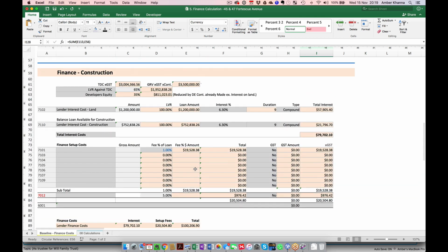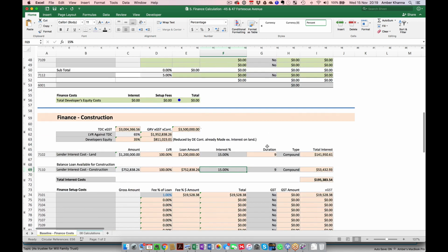If there is no bank involved, then your interest for the bank that you got at 6.3 should be 15%, because you have to pay them that money. So let's say you settle on the land, and lender interest cost for construction, LVR is 100%. But even then, if there's no bank involved, the interest on the land and on the construction is 15%, isn't it? And I would be very realistic about the...